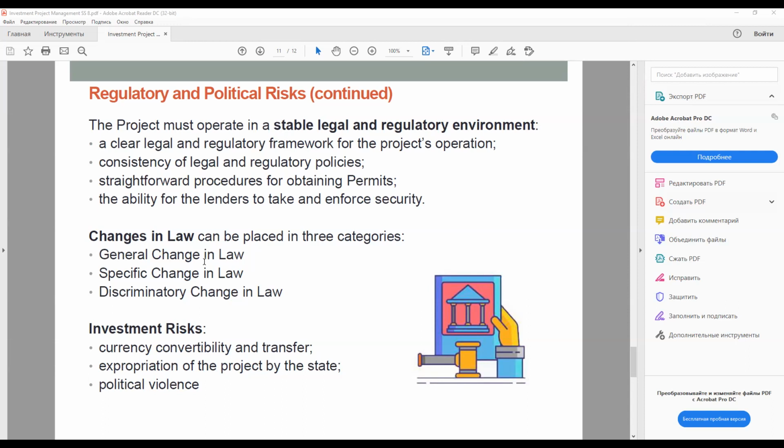These risks may be passed on by the project company to the off-taker or contracting authority by requiring compensation for the project company if losses are caused by them. However, when the time comes, the host government may simply be unwilling or unable to fulfill this obligation, and political risk guarantees or insurance may be required to cover these risks.